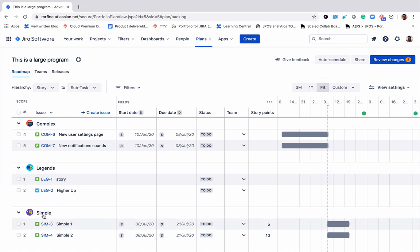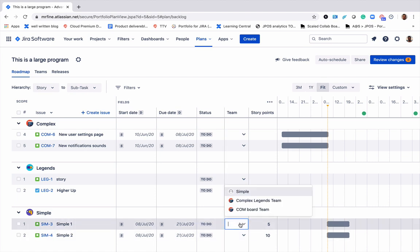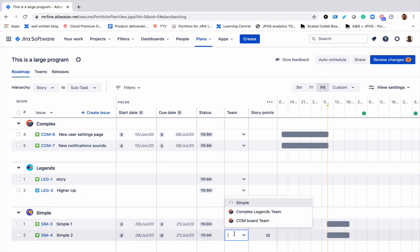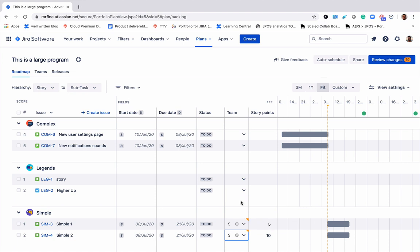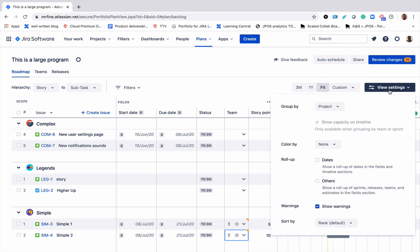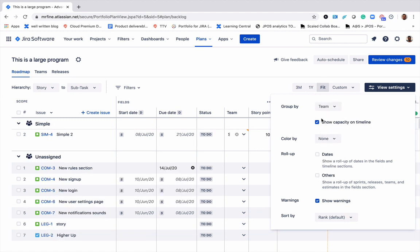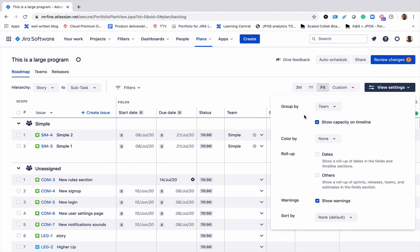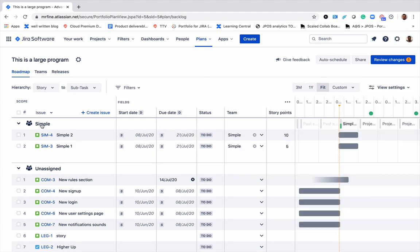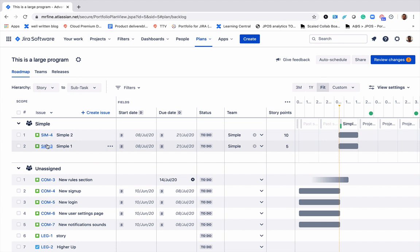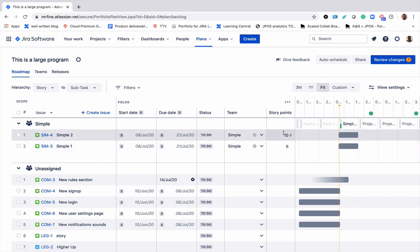We can see that under the simple board, there are two stories here. We'll go ahead and assign them to the simple team. Now we'll go to the view settings and group this view by team. Now we have the name of the team here and all the issues that are assigned to that team. We can see the effort involved and here on the timeline we see the sprints.